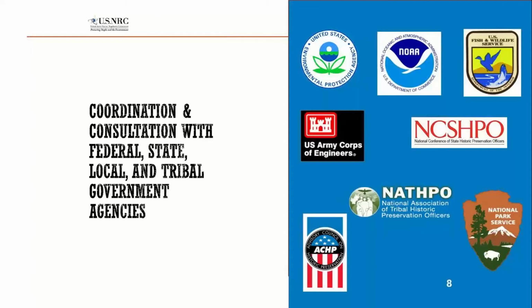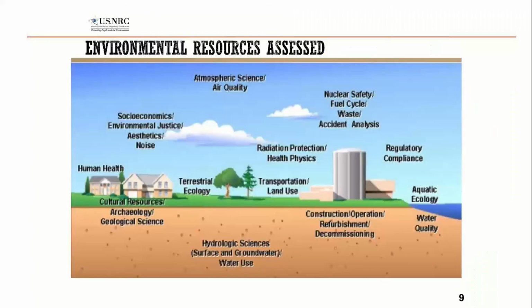You may ask, what is a cooperating agency? It is any federal, state, local agency, or tribal government other than the lead agency which has jurisdiction by law or special expertise with respect to any environmental impact involved in the proposal. And we have an MOU with the Corps because the Corps has the lead for the Clean Water Act Section 404 program. So it's one EIS, one document, which streamlines the review process for the prospective licensing. Slide 9, please.